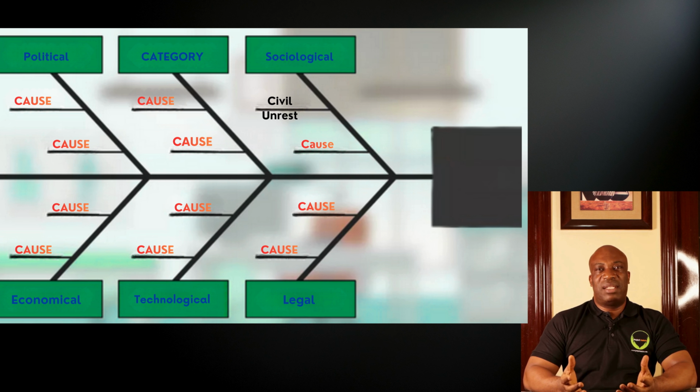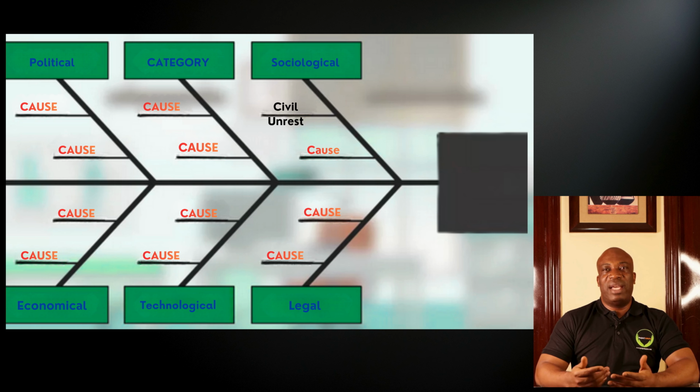We have already discussed the categories. So what you need to do now is put the main primary fishbone as a category, as you can see on number 2. And then the rest of the other causes and also the effects, you put them at the small bones on the fish, like what you can see on item number 3. So this is how you might also want to analyze the risk, cause, effect, and also event.